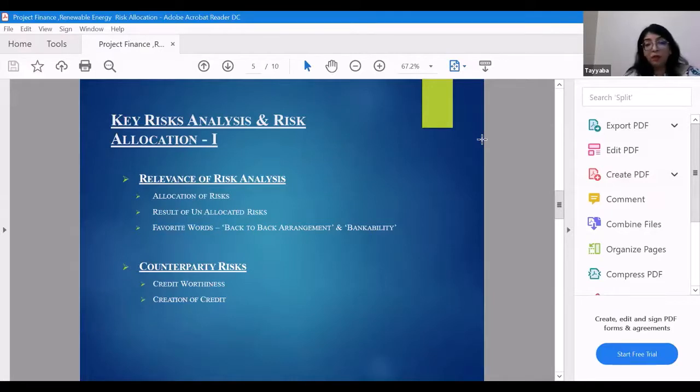There could be a force majeure situation. There could be a heavy breakdown of machinery. There could be many other things. So to ensure that the project runs in accordance with what the off-taker wants, O&M contracts, operations and maintenance contracts, are also entered into, and they are long-term contracts, typically for 10 years, mirroring the duration of the loan. The O&M contracts focus on the operating period risks.